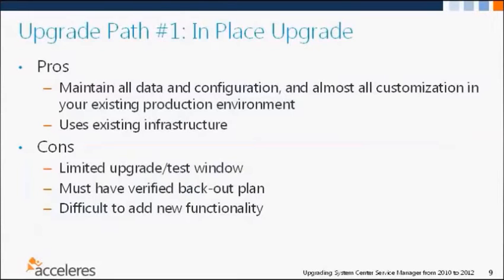So you really have a fairly limited window, and it adds to the importance of the planning for doing this, because if you're going to do it in an evening, you've only got an evening. It's probably an unrealistic amount of time. If you're going to do it over a weekend, that's a little bit better, but even so, you have to make sure you leave enough time for a rollback, enough time to test your rollback, and make sure that everything's back the way it was. So it puts a lot of pressure on getting the upgrade done during that window.